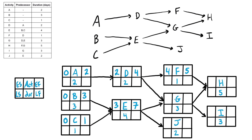Activity G has two predecessors — D and E — so we bring the larger early finish: four or seven, we bring in seven, add the duration of three to get an early finish of ten. Activity J has one predecessor, so the seven from E comes straight in and seven plus two gives an early finish of nine. Activity H has two predecessors, F and G — we take the largest early finish: five or ten, so we bring in ten and add the duration to get fifteen. Activity I has one predecessor, so we bring that ten straight in and ten plus three is thirteen.